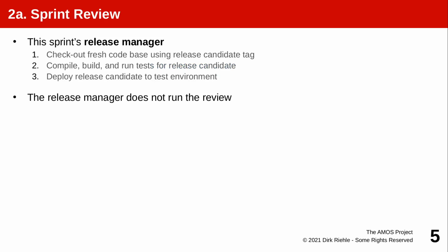The team meeting starts with a sprint review. In a sprint review, I know it's not always possible, but ideally the release manager shows to everyone. It's always show and tell. Show me. Don't talk about it. Show me. It's always ideally show and tell. And ideally the release manager can check out and build the software in front of everyone's eyes, so that everyone sees this builds nicely.